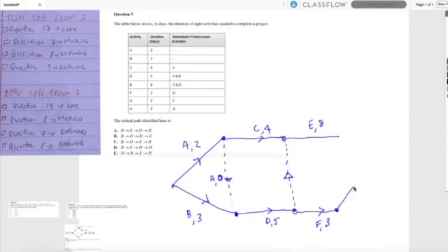I'm just heading because I can see what's going to happen here. G, straight off F for 2. H, straight off G for 3. And I'm going to extend E. There we go. So E has no immediate successor, but it's got to be done. Otherwise, the job won't be finished. So this point here represents my finish point where all jobs are completed.